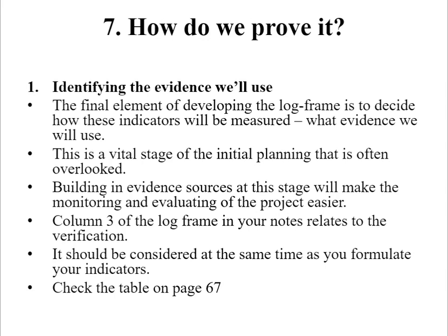The last question, which is question number 7, is how do we prove it? Here, the focus will be on the means or sources of verification, just to know if the objectives formulated have been achieved. This is the final element of developing the logical framework and a vital stage of the initial planning that is often overlooked. So, building in evidence sources at this stage will make the monitoring and evaluating of the project easier. Column 3 of the log frame in your notes relates to the verification, and it should be considered at the same time as you formulate your indicators.